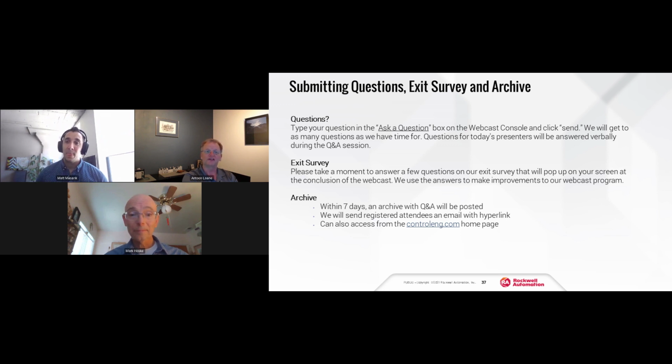What they achieved was a savings of 5 full months on the project. So before commissioning was done, they'd made so much progress, and they were so far ahead of the customer's expectation that they received 2 additional orders simply from confidence in the solution. And best of all, the guys got to come home for Christmas because they got so much time out of their commissioning cycle. So that's the real cherry on top. So budgeted 10, normal project for them, achieved it in 5, so an incredible savings, and then the cherry on top is they get to be home for Christmas.